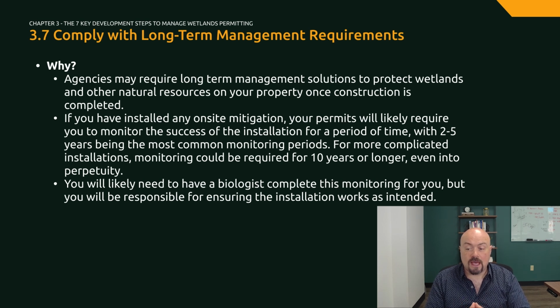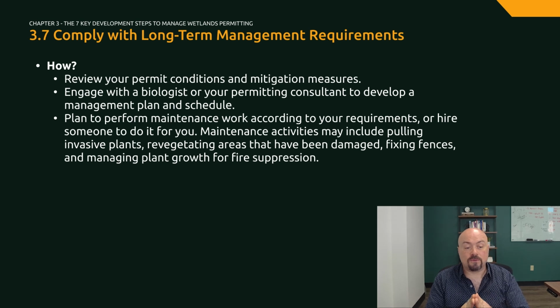You will likely need to have a biologist complete this monitoring for you, but you will be responsible for ensuring the installation works as it is intended. You will want to make sure that you review your permit conditions and mitigation measures, and then talk to a biologist or your permitting consultant to develop a management plan and a schedule for long term. Make sure to include performance maintenance work according to your requirements, or hire someone to do it for you.